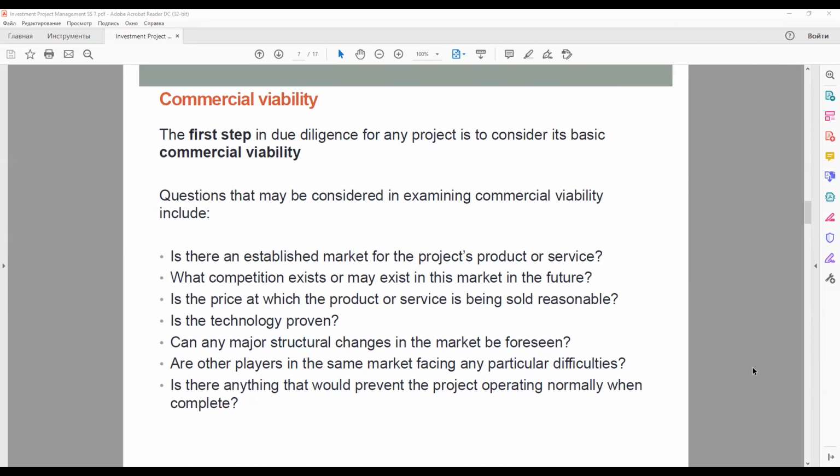So if you do not include a provision for adjusting prices for input supplies provided to you, in case of sudden changes in market prices, for example, as now, when all over the world inflation is roaring and the prices for all commodities and supplies keep growing, it's virtually inevitable for a supplier to try to get out of the contract if he cannot increase the prices market to market.